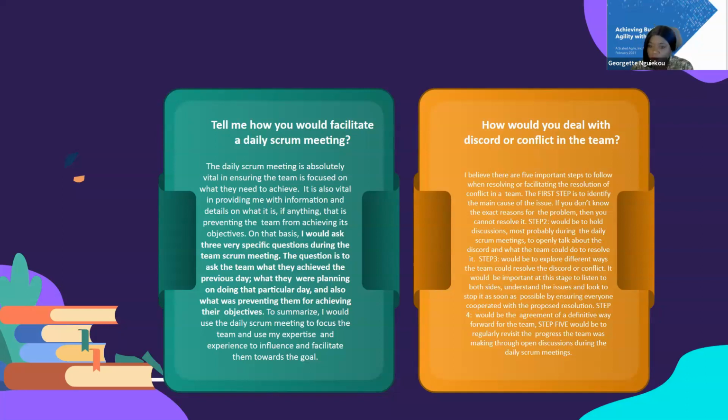Be proactive, but also bring that issue to the retrospective, not to name people, just to discuss with the team and put it on the working agreement. When you work with your teammates, this is how you do it. So they will come up with the solution themselves and you put it in your working agreement. That is how you build your working agreement with your team. So you see, simplify it like this, and then that will be easy.